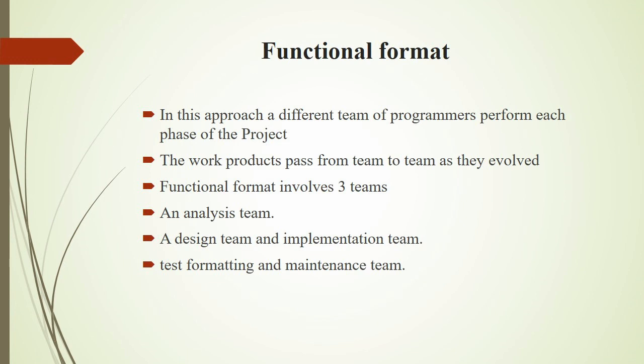Functional format. In this approach, a different team of programmers performs each phase of the project. The work products pass from team to team as they evolve. Functional format involves 3 teams: an analysis team, a design team, and implementation team. The third one is test and maintenance team.